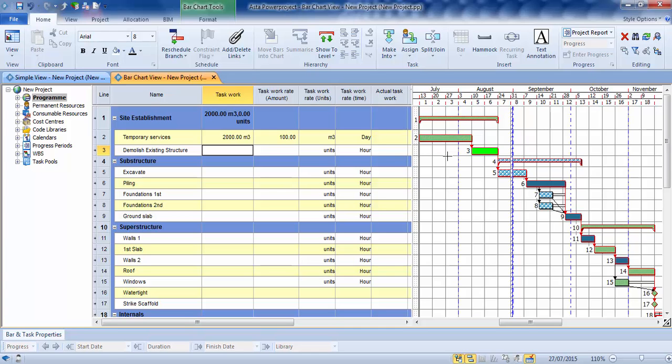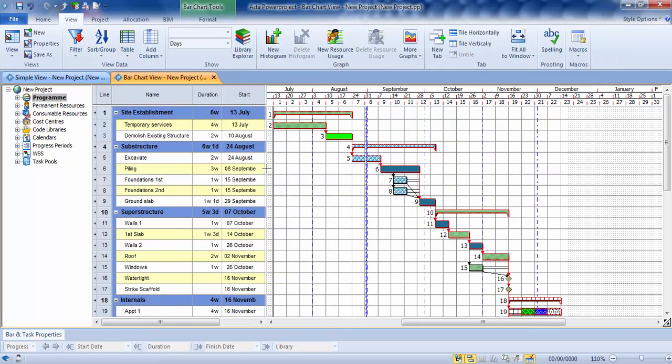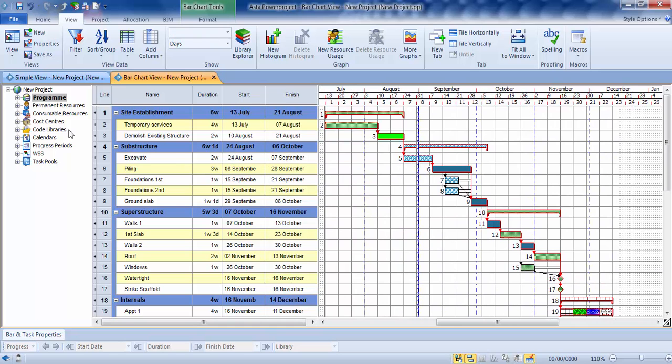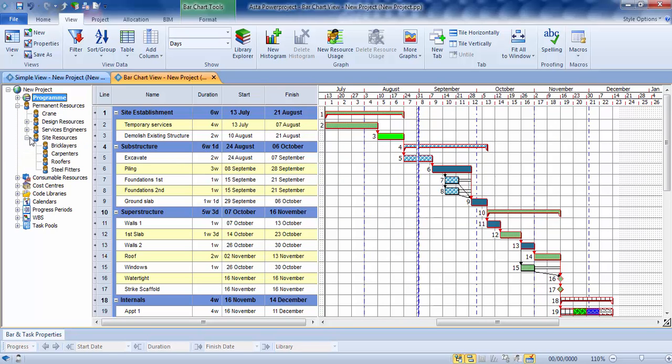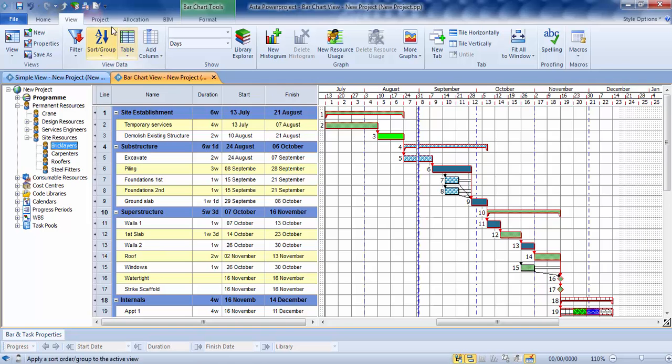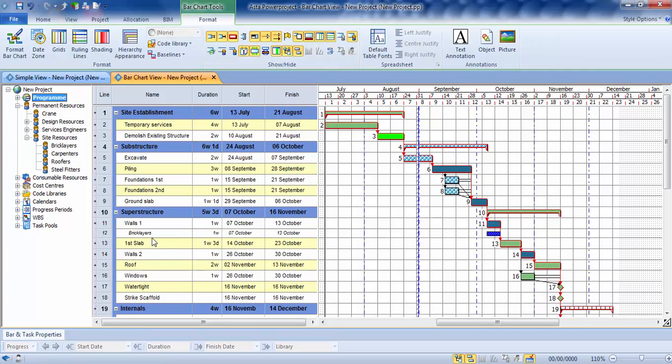You can then use your reschedule button to work it out and then for it to calculate the critical path through the program and give you your projected new end date based on the information you typed into this table. So that's task work. So that gives you one way of being able to change and affect the duration of tasks without resources assigned. So the next thing we're going to look at then is actually assigning resources and how those work. So what I'm going to do is just change this table back to the default table. Over here on the left-hand side then we have our permanent resources. So what I'm going to do is take a bricklayer and assign it across to the task. So bricklayers will be doing walls obviously. So we'll take bricklayers, click and drag and drop them onto walls. Now you can't see the bricklayer first time you've assigned it, and that's just because it's currently hidden. So on previous clips you may have seen this. You can go to format and just unhide the resource. It now shows underneath as you can see here as a secondary line.